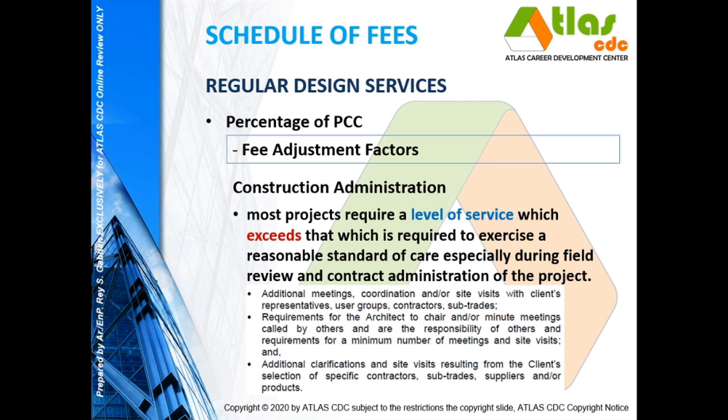So if you think that there will be a possibility that additional work will be undertaken because of the complexity of the project, like doing additional meetings, coordination, site visits with clients' representatives, requirements for the architect to chair or minute meetings, or additional clarification site visits resulting from the client's selection of specific contractors, subtrades, suppliers, and or products, then it means that there will be more work to be undertaken by the architect.